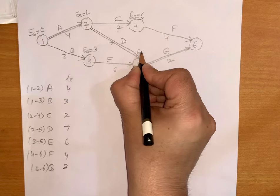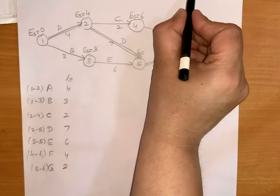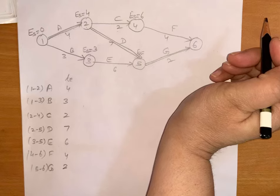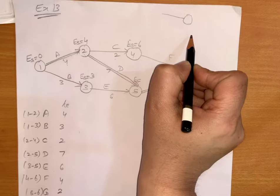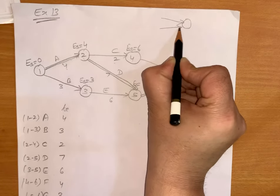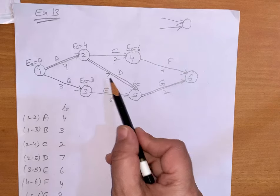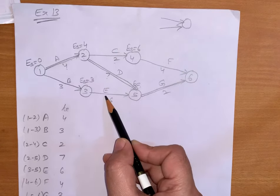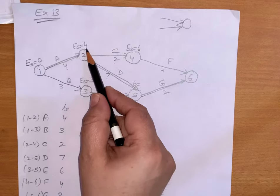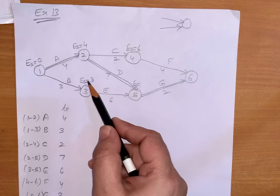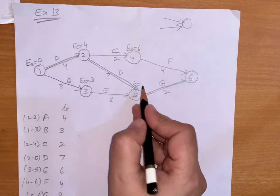Now for the fifth event's earliest start time, you can see this is an event where two activities are merging. So how to find out earliest start? If I go by one path it will be 4 plus 7 equals 11. If I take into consideration activity E it will be 3 plus 6 equals 9. There are two activities: 4 plus 7 gives 11, and 3 plus 6 gives 9. So we are to take the longest one — we will take 11.